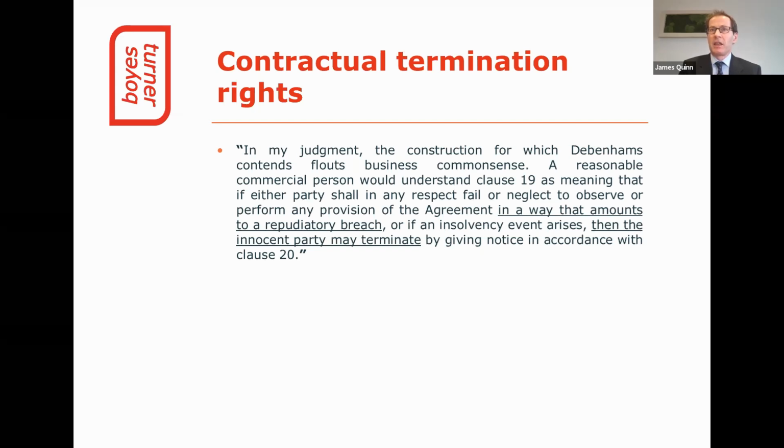It seems clear from these cases, therefore, that despite what on the face of it is a very wide form of wording referring to any breach of the agreement or a breach of any obligation in the agreement, the court is unlikely to find that a party may terminate for simply any breach, and that a breach of a condition or some form of repudiation is likely to be required. It would therefore appear to be a very high-risk strategy indeed to terminate or seek to terminate based upon just any breach, including a trivial breach of an agreement.